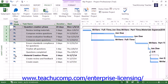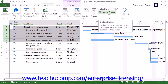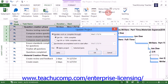Once they've been selected, you can then open the Update Project dialog box again. This time, however, you would simply choose the Selected Tasks choice in the For section to update only the selected tasks as of the date selected. This allows you to then update some tasks individually as needed.